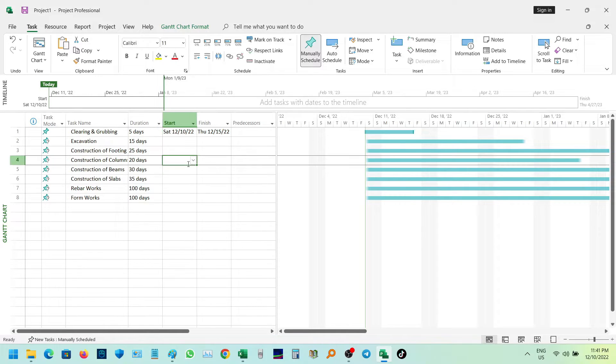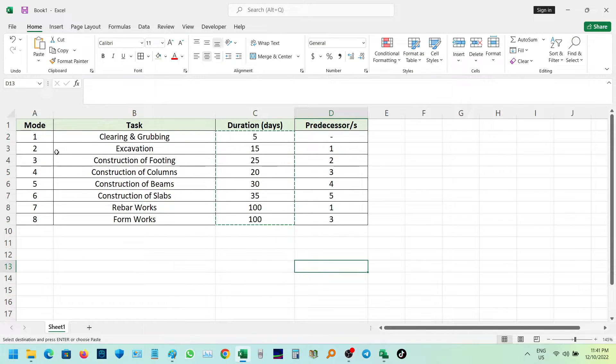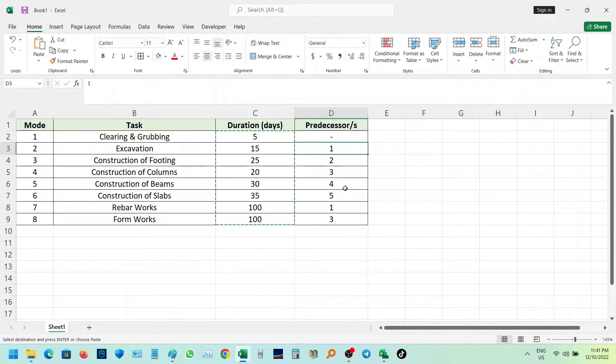For the first task, let's assume the start date as a reference. Then manually input the predecessors from Excel into MERS project.